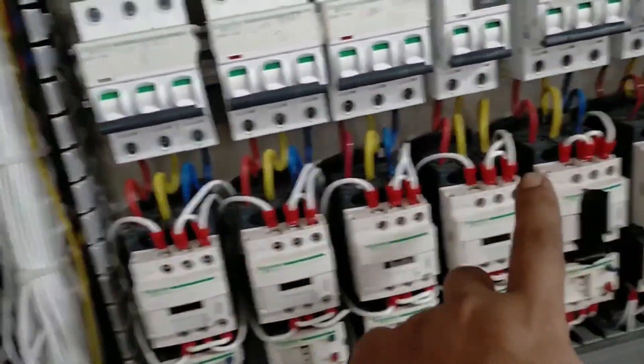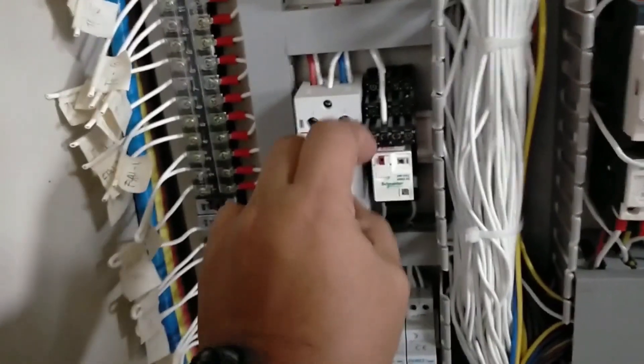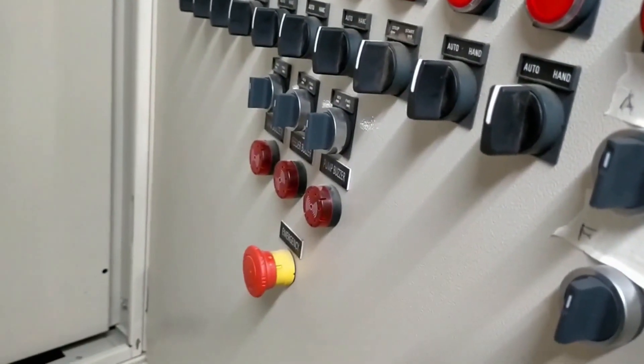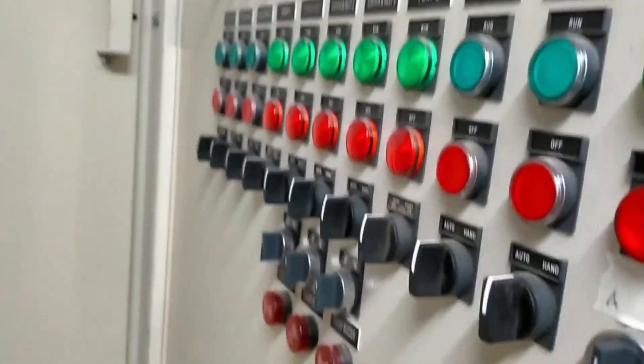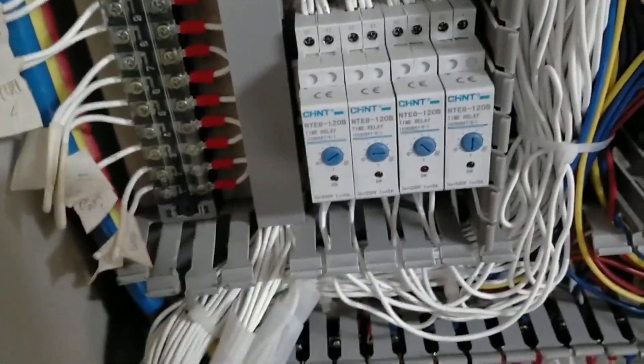Commissioning Documentation Preparation and Handover: The following documentation is prepared before start-up or at the end of commissioning, and is to be handed over once the commissioning process has been completed. Engineering documentation includes: cable diagrams and schedules, instrument indexes, system and margin and junction box cable schedules, vendor lists, vendor manuals including all vendor documents and drawings, and contractor commissioning and start-up plans.